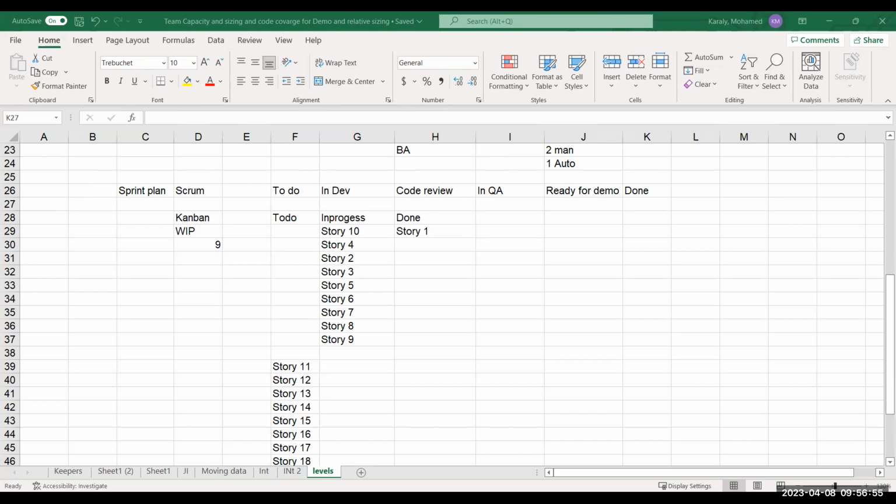Definition of ready, the team has agreed that the story has been reviewed and sized by the team. The story must be written by the PO. A clear story has clear acceptance criteria. The story is pointed. So I'm going to say this link is in the class as well, and I believe it is in our team norming exercise, but this is something that we're sharing right now.